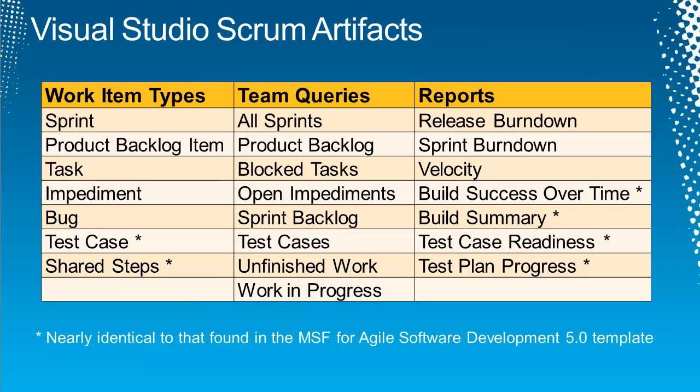So let's look back over the last X number of releases or sprints and see how many story points, which are our abstract unit of effort we're using. How many story points have we been delivering per sprint? And let's say it's averaging 35 points. Well, then going into sprint 7, for example, not to commit to more than that or commit to less than that because you guys are going to be going on spring break or going on to training or something. So velocity is a way for you to kind of look at your historical speed at which you're delivering these business value items, these product backlog items, in a way to kind of say how can we use that as a gauge for what we can do in the next sprint.